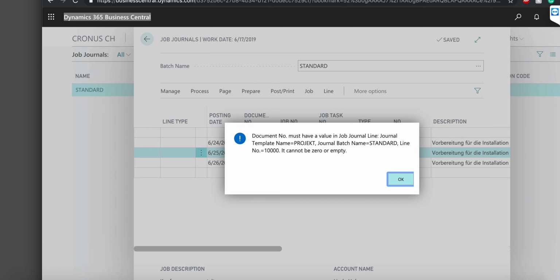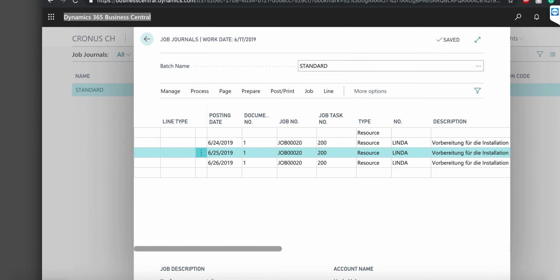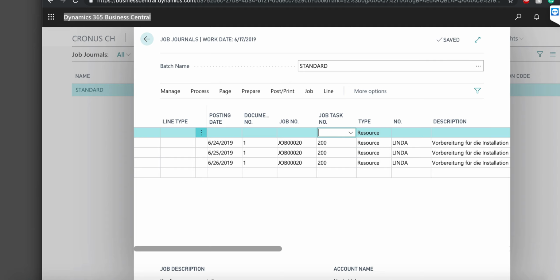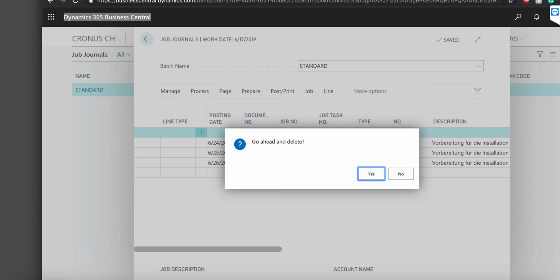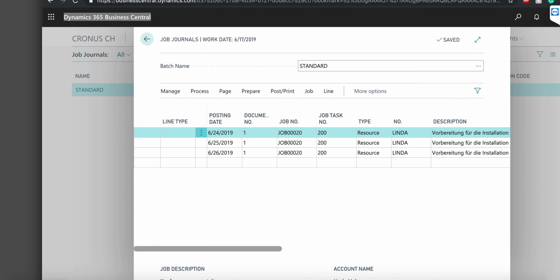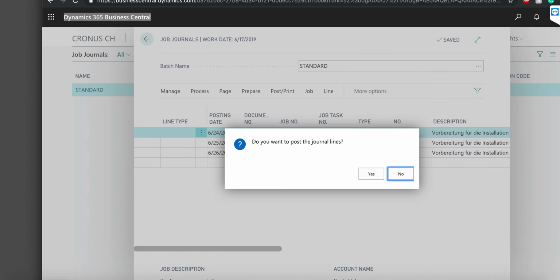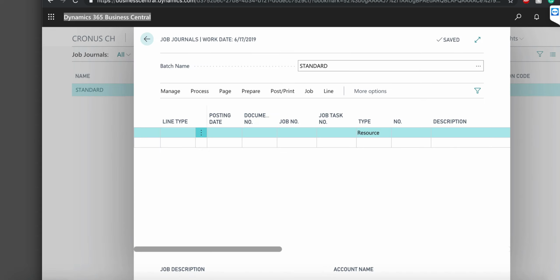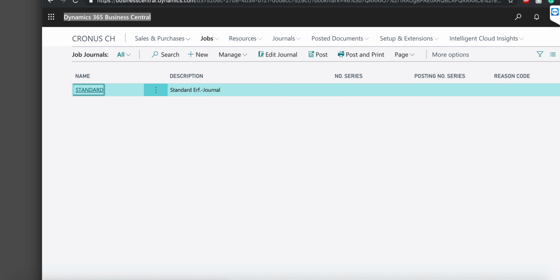Managing project supplies of items, services, and expenses is an integral and critical aspect of the execution of all jobs. You can use inventory quantities or make job-specific purchases using purchase orders or purchase invoices. For example, a new conference room installation job requires a new table. You create a purchase invoice to buy a new table and record the job that it will be used on.